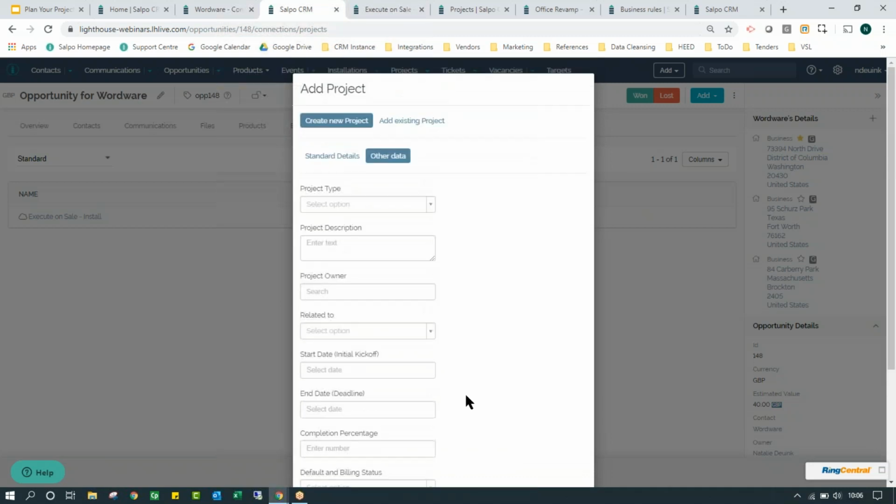I might have if it's an internal or external project, and I might want to start looking at different things like estimation, so that we can track scope creep and really assigning and defining how many days are going to be allocated to this. So maybe I want a formula field to calculate what's the difference between the start date and end date, and did we get it resolved within that time or not, or how many days. Maybe we have an end date, but then we have a third date field that says true end date or completion date.